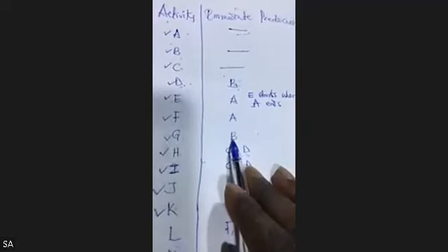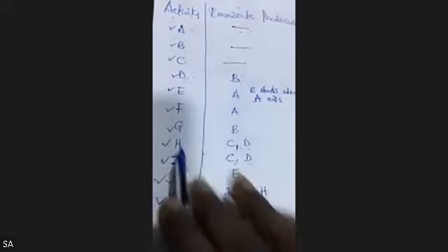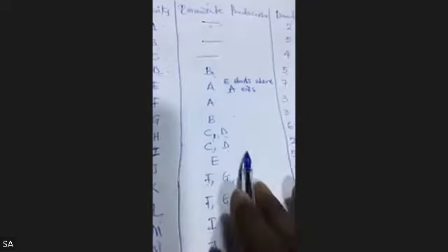Okay. Does G appear elsewhere again? Yes. So this is actually dependent activity. So G must start where B ends. So you can see FGH, FGH, FGH. Okay, they must have the same node. What do I mean by saying they must have the same node? All of them must point toward the same direction. F, G, and H, they must point toward the same direction. You cannot miss it once you understand these things. Okay, when they say C and D, it doesn't mean that C will be somewhere and D somewhere else. C and D, they will look at each other, seeing each other like this. So FGH must see each other face to face. The activities that must happen concurrently.